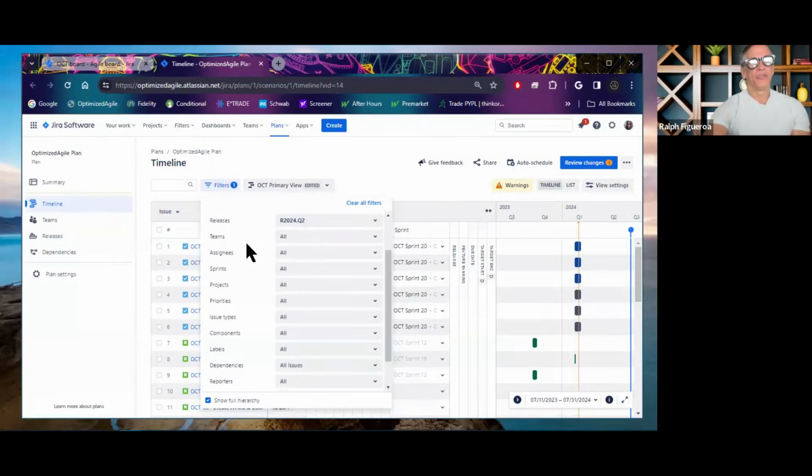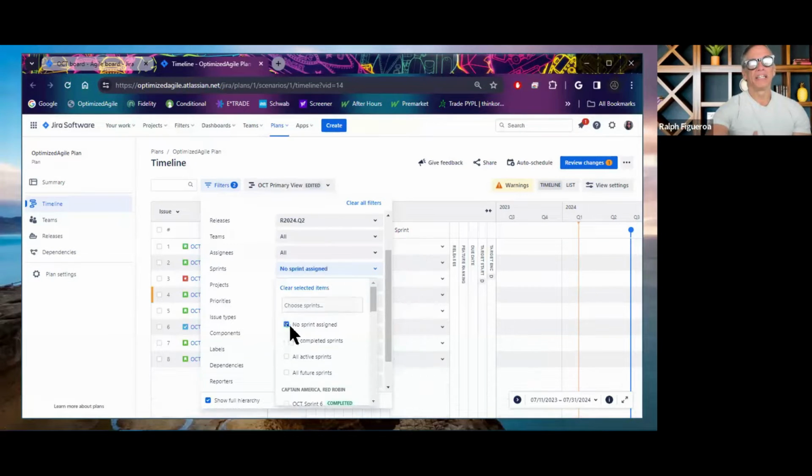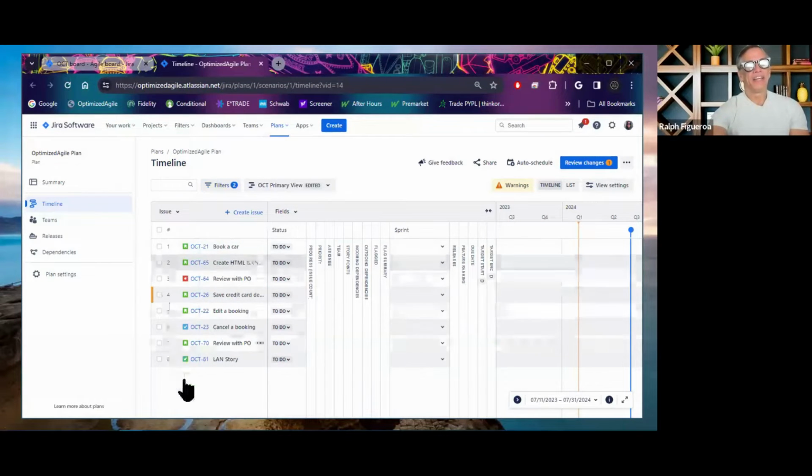The other thing that you will do in the sprint planning is that you will also more than likely be working with things that are not assigned to a sprint, right? If it's assigned to a sprint, it has been planned already to be slotted into that sprint. So by clicking on this checkbox, notice that I'm not writing any JQL. Notice that my list in the background has shrunk dramatically. So I'm using the fixed version. I am tracking things that are not part of the sprint. And now here I have a list.